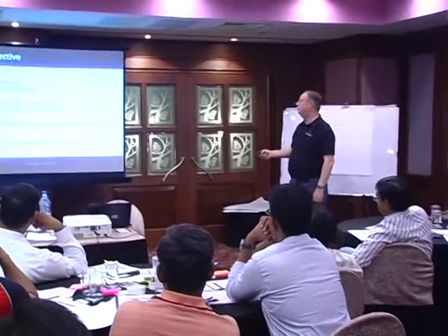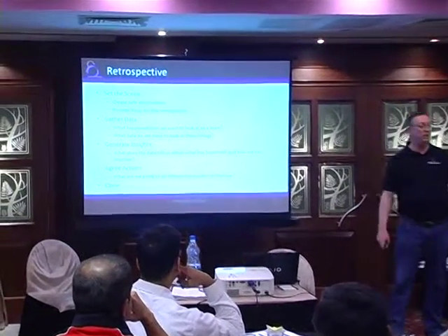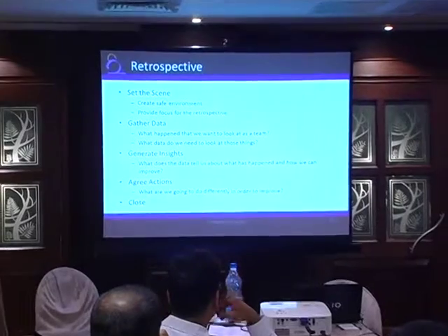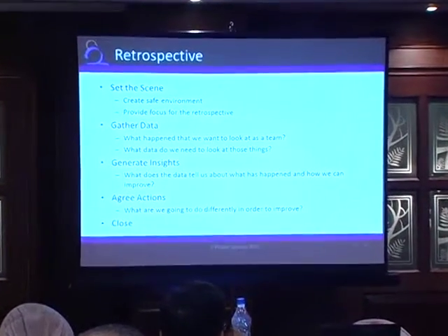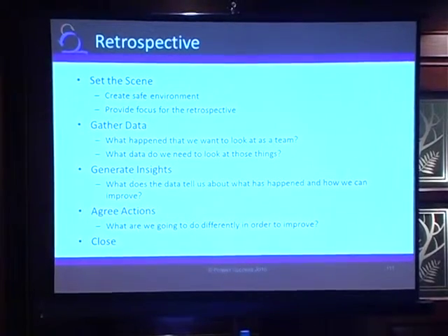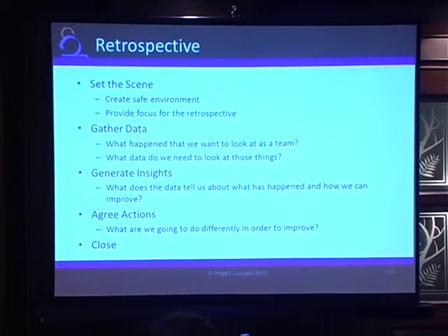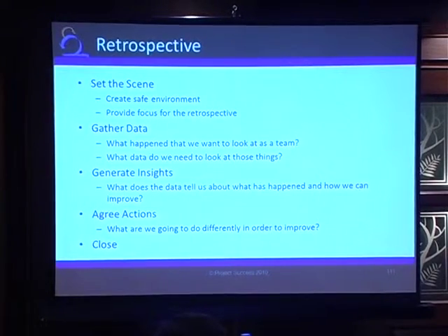Once you've got the focus, gather the data. What happened that we want to look at? What data do we need to have to really be able to analyse what happened? Once you've got that data, what's it really telling you? What insights is it really giving you? What are the real problems? What are the real opportunities to improve?